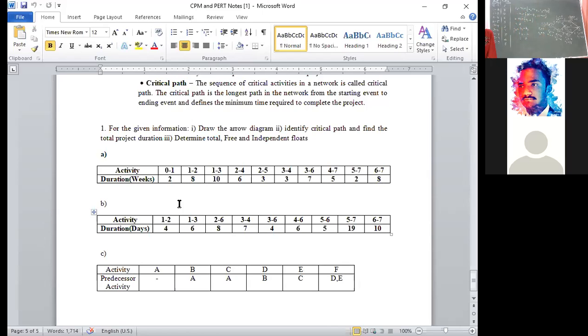Students, this L0 value is not coming as 0. Whatever calculations you did, you don't know the earliest to finish value. Wherever you start, you end here. Whenever you are computing backward pass calculations, if you are unable to get the value 0 here, that means maybe there is a calculation mistake. Otherwise, your network diagram is wrong.